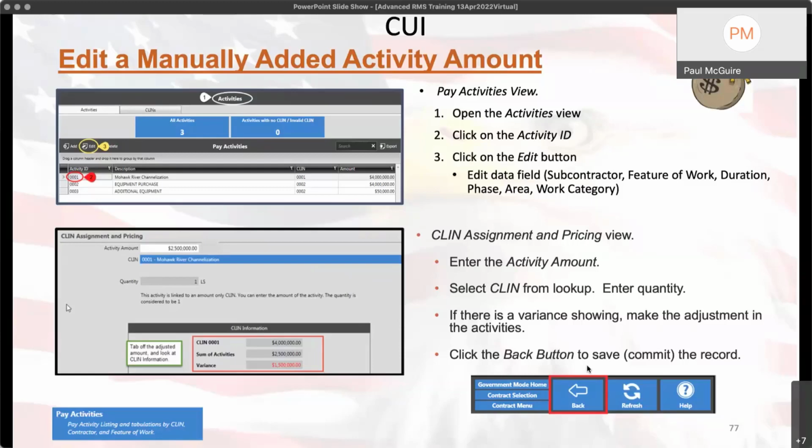So you can go to the import export screen and you can go to the import SDF NAS and see what the contractor's doing when they're importing their schedule, as well as going to the actual pay activities or the schedule, right? The activity schedule. But again, if you're using Primavera and you're changing stuff on the screen, that should be a big red warning light, because all that needs to happen inside of Primavera.